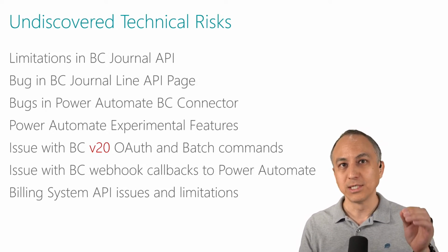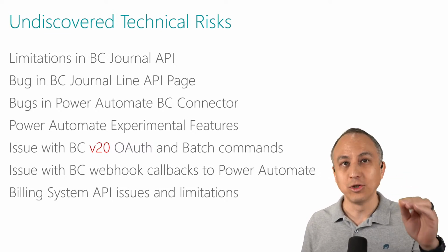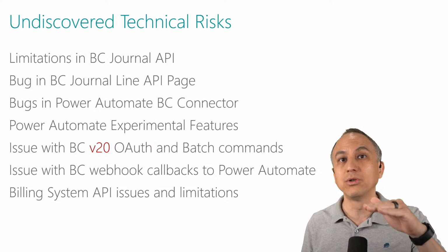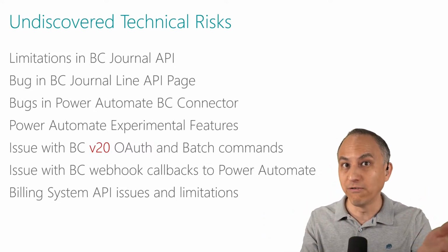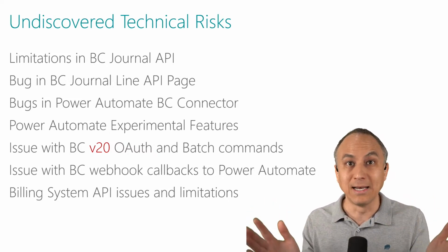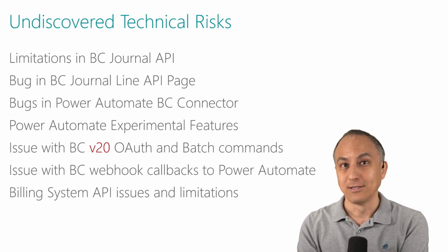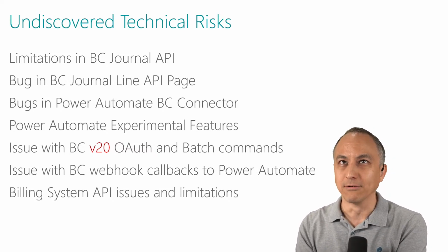So if you propose 10 hours to do this project, that is assuming everything works properly and perfectly and things go smoothly. Maybe the customer has a few changes, like change the description field. Simple stuff, right? That's just a field remapping or concatenation, whatever. But that 10 hours does not anticipate showstopper technical issues that you could not have anticipated. Well, what are you talking about, Steve?